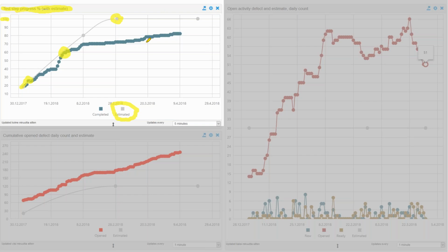The situation was that everything was not ready when they started the testing, but there was a very clever test manager who selected the right cases so that they could test as much as possible. Okay, so they started testing software that wasn't completely ready, but tried to do their best to begin the testing anyway. Yeah. You have several test cases, and the test manager selects them row by row: okay, that can be checked, and that can be checked. He does what he can.